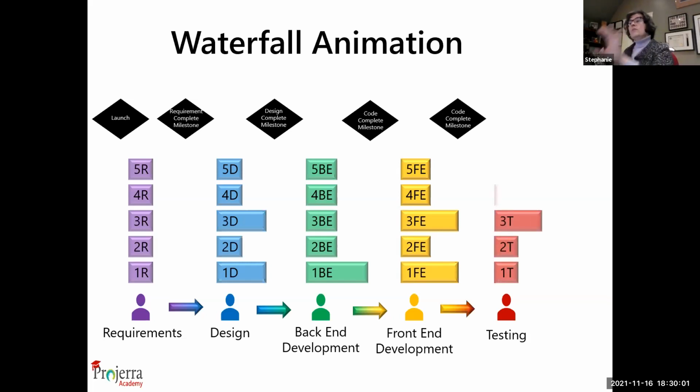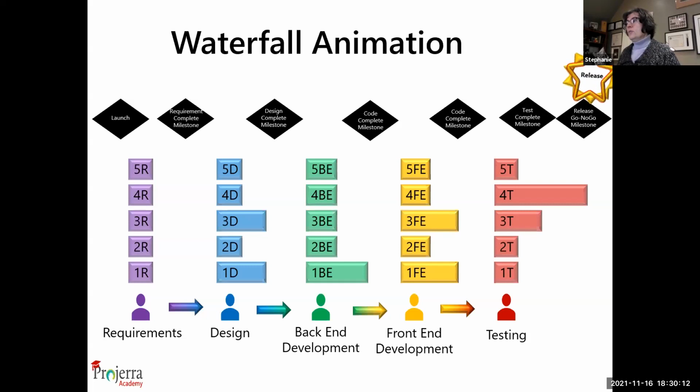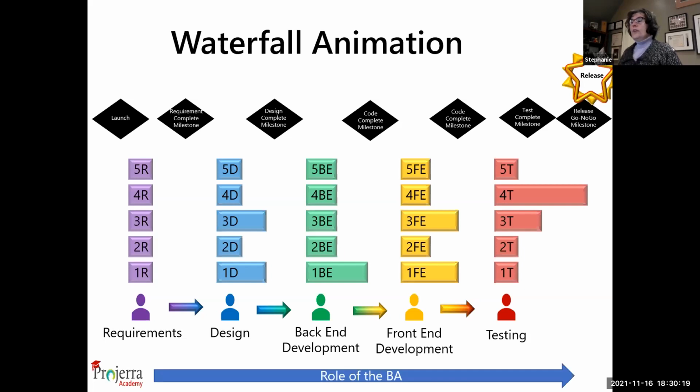Notice how everything moves in chunks. You have to complete all milestones and all activities of that phase before the whole thing moves on to the next. Testing complete, we've got the release, yay. That's what a waterfall looks like. The role of the BA is, of course, throughout all the different phases.